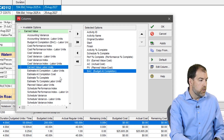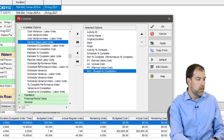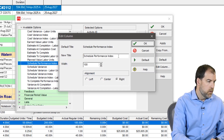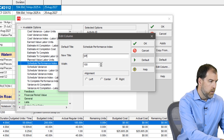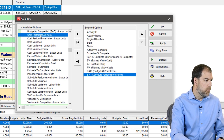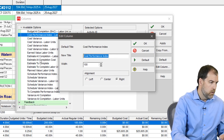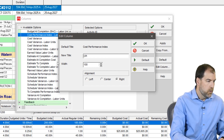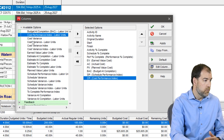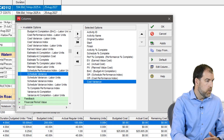Now that we've got our main fields, let's add our index fields. The main indexes we like to look at are schedule performance index — click it, rename it to 'SPI' — and cost performance index — add it in and rename it 'CPI.' Lastly, we have our variance fields: cost variance and schedule variance. Add them both in.